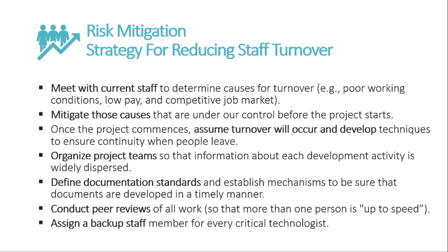Then the next strategy we can do is organize the project team so that information about each development activity is widely dispersed. Then define the documentation standards and establish the mechanism to be sure that documents are developed in a timely manner. Then conduct peer reviews of all the work.